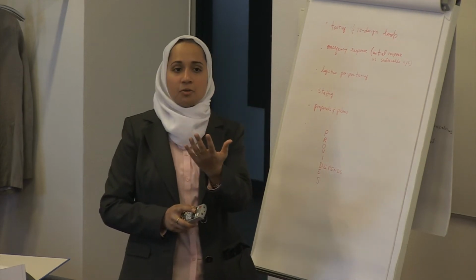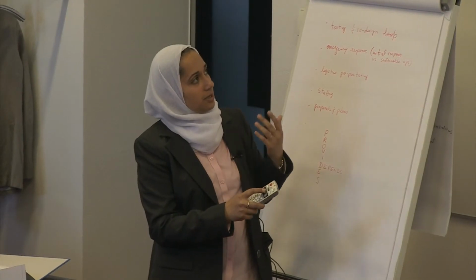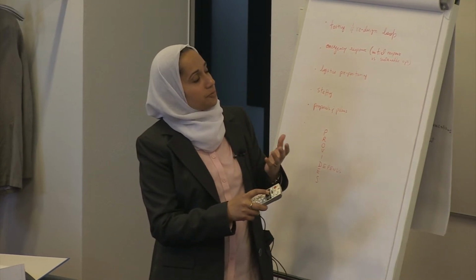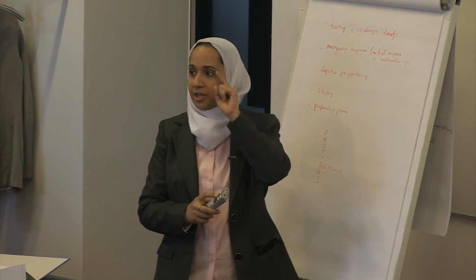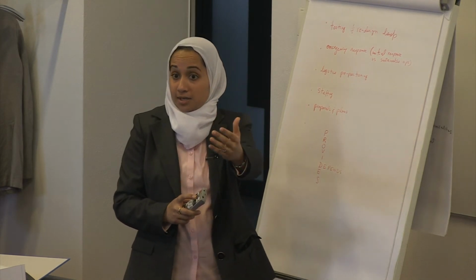So you can immediately spot, when you're looking at the matrix representation, whether your task arrangements or your graph has cycles or not. If everything is below the diagonal, so everybody knows what I mean by the diagonal? Basically this is the diagonal where the numbers are, okay? So this is the diagonal of the matrix. The numbers are just showing the task durations. You don't necessarily have to put them there, but this is one convention. And everything below these numbers corresponds to X's or arrows that are all feed forward, meaning that they all go from left to right, right? And everything is in a sequence.